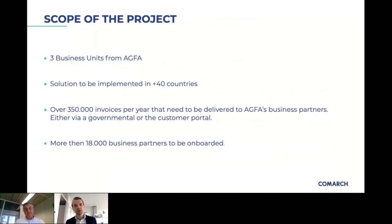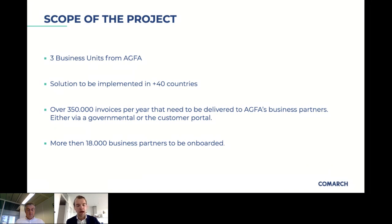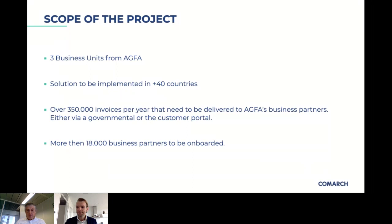Thanks for telling us more about the scope. It sounds quite extensive from both AGFA's and Comarch's sides — implementing a solution in 40+ countries across three different business units. How does a company like AGFA set up such a program? Well, we set up a steering committee as a first decision. An important dimension is that Comarch participates in that steering committee, so we have direct contact on progress, problems, and successes as we move forward.